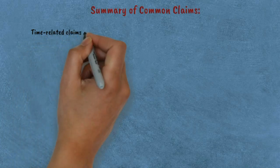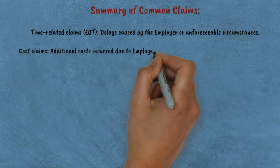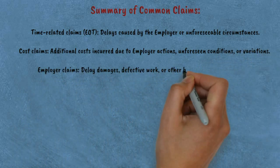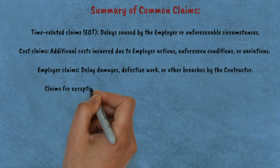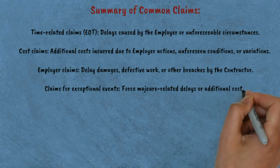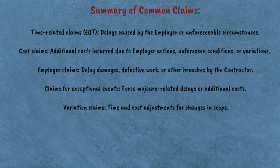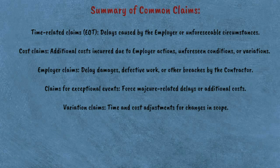Summary of common claims: time-related claims (EOT) for delays caused by the employer or unforeseeable circumstances; cost claims for additional costs incurred due to employer actions, unforeseen conditions, or variations; employer claims for delay damages, defective work, or other breaches by the contractor; claims for exceptional events covering force majeure-related delays or additional costs; and variation claims for time and cost adjustments for changes in scope. All of these types of claims are generally managed through Sub-clause 20.1, which provides a structured procedure for how claims should be made, assessed, and resolved. The process usually begins with a notice of claim, followed by detailed particulars and then the engineer's assessment or determination as detailed in Sub-clause 3.7.